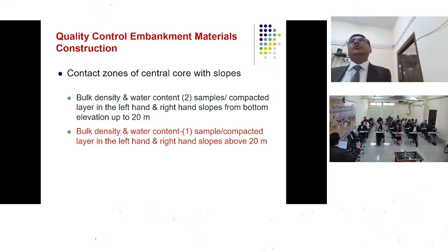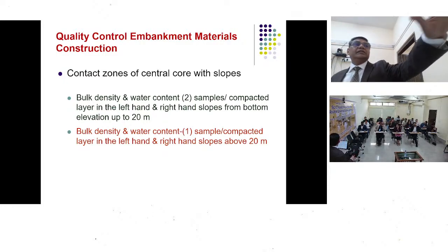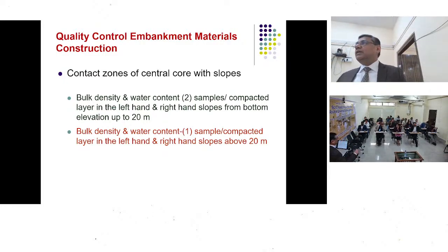And maybe after 2 or 3 or 4 or 5 weeks, or a month or so, they start looking at these documents. Okay, what are these? And what really gets missed, many times, is the instrumentation data, because nobody is going to take care of that. They will tell us, okay, these are the basic parameters: this is the height, this is the spillway capacity, this is the power generation. Those are the major components which the maintenance team is looking at, and that becomes a big lacuna, which everybody has to look into.